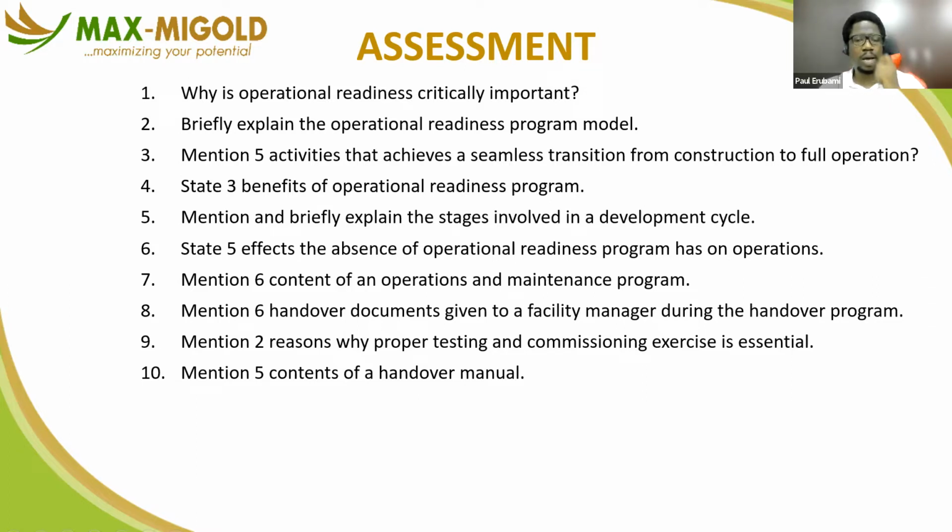Take, for example, somebody who has air conditioners pasted around the high-rise outdoor units, and you have to use cranes or scaffolds to get to them once in a blue moon to do servicing, right? You know what those costs are, you know what those inconveniences are, you know what the risks are, document them. You know what the ideal situation could have been. Project that. Let's assume I do air conditioning servicing 4 times a year at a cost of 20,000 naira per 1.5 horsepower air conditioner. That's 20,000 a year, right? Project that over 30, 40 years of maintaining ACs in that building.